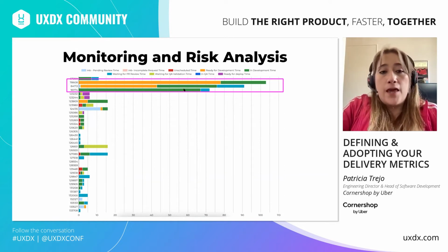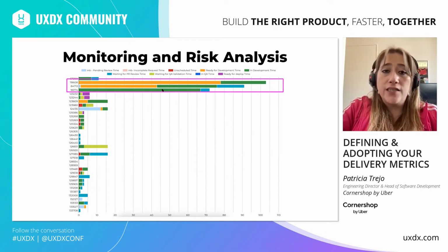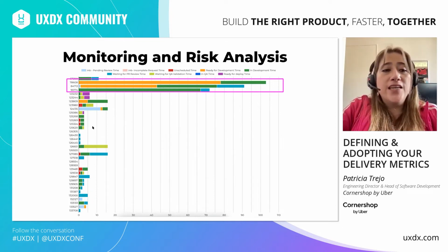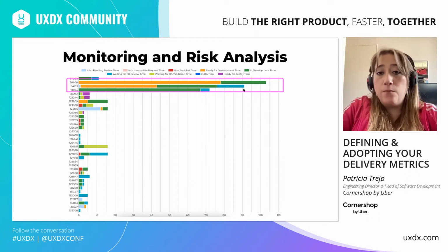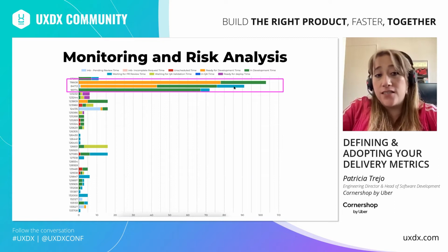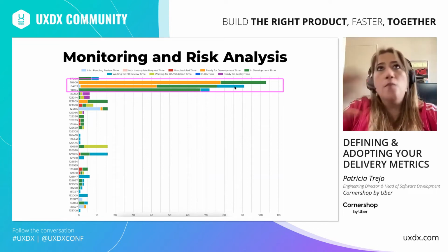For example, these unwanted behaviors were generated and otherwise unreal because the card has already finished. In any case, there are still process things that the team had to work on. Make visible blockages due to dependencies, break the work into smaller tasks and not a single task, carry out the PR reviews as soon as the development finishes, among others.